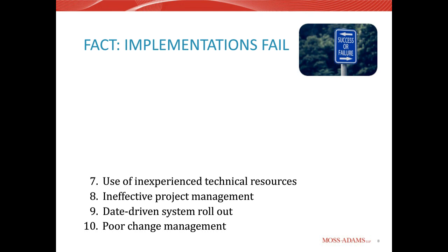I was once brought in as a consultant for a client on a failing project. And I remember I sat through a few of the vendor training sessions, and I couldn't help but notice that the resource was struggling to navigate through the system. I immediately escalated the problem and requested information on the background of the resource. It turns out it was his first implementation of the system.